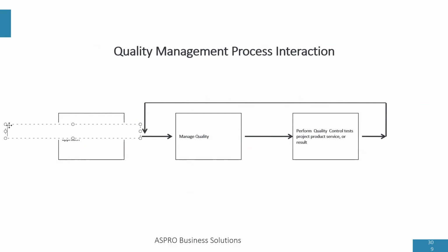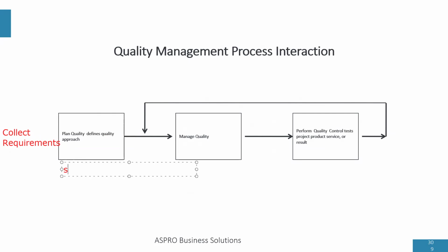We got requirements from the collect requirements process in scope management, which means once you've drafted the requirements, you can start quality planning. Based on the quality planning, we will now determine the standard we need to meet the customers' requirements. That's one of the things quality planning does. It helps us to capture the standard that will help us meet the requirements.